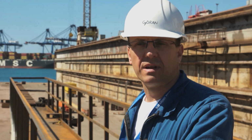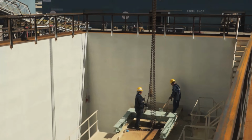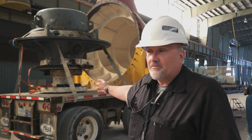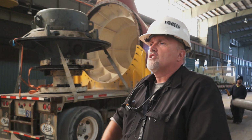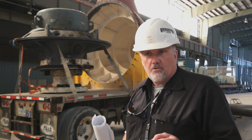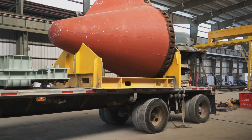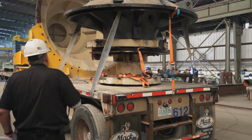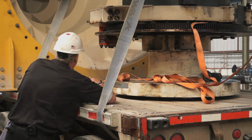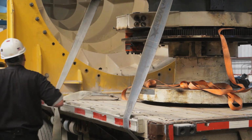So what's going to happen in the next few days before the vessel is in dock, the complete rehearsal of the bearing exchange will be performed before the vessel is in. This is an extra bearing we have, and an end cone for the azipod. With this equipment we will make sure everything is in order for this critical job. It is very important to do this test because time is very limited, and we basically do not have all the equipment we would have in a normal dry dock to test. So all this is coming over, the cone and the bearing, so we can test it in the equipment that we will use for Allure and make sure when the vessel comes in, everything fits.